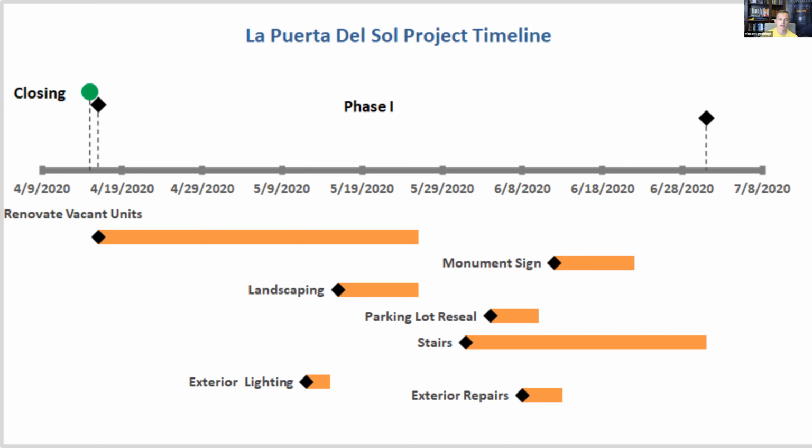And a lot of that is because, like Duke was saying with the leasing, people are moving in really fast. So we had this plan to renovate these vacant units to a higher level that are going to take more time. But then people are coming to him without any marketing saying, hey, we need a unit. So he's switching gears to, okay, let's put off the heavy renovation units and get the ones that are easier, that don't need as much work.